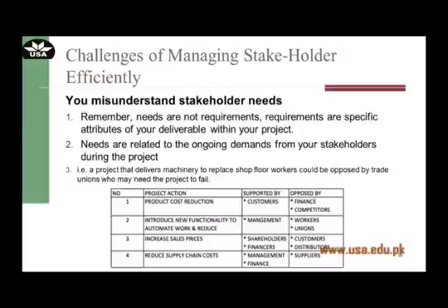Another mistake that project managers normally make while identifying and developing strategies to manage stakeholders is that they fail to identify the stakeholder needs. Here, I want you to remember that needs are not requirements. Requirements are specific attributes of your deliverables within the project. Needs, on the other hand, are related to the ongoing demands from your stakeholders during that project.